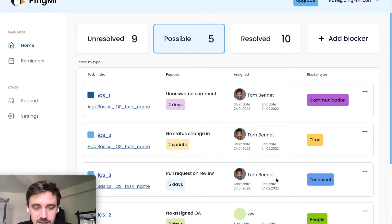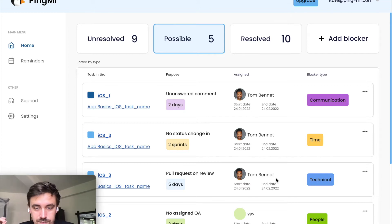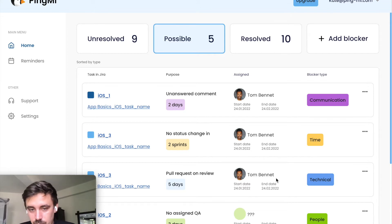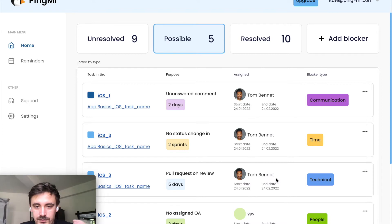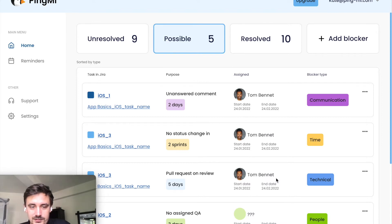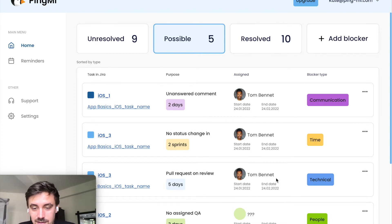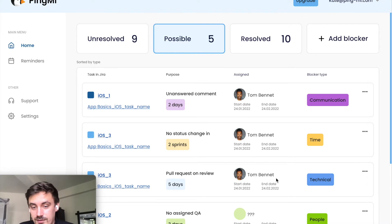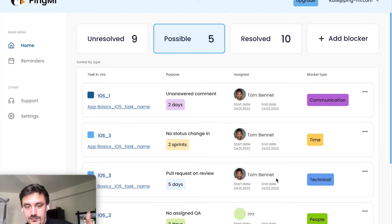Third type is about pull requests like technical one. It's when developers review their code, it can take too much time. For example, in five days, we will remind you that something's wrong with review.